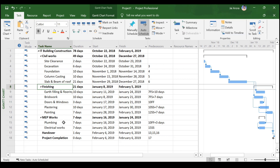MEP work will be 1.3, handover will be 1.4, and project completion will be 1.5. Similarly, site clearance should be 1.1.1 and so on, and earth filling and flooring should be 1.2.1 and so on. This coding can be done with several permutations and combinations of uppercase alphabets, lowercase alphabets, symbols, numbers, and so on.